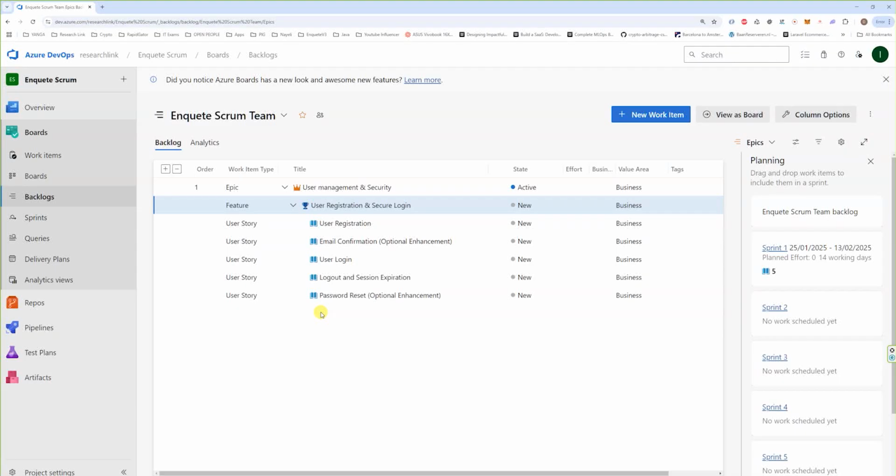And that brings us to user stories. So I want you to look at the hierarchy. A user story hangs under a feature. A feature hangs under an epic. These are all methodologies, all systems that are used to help break down a big requirement. So you have a big requirement, you have to learn how to break it down into different smaller chunks. And these are terms you're gonna hear a lot.